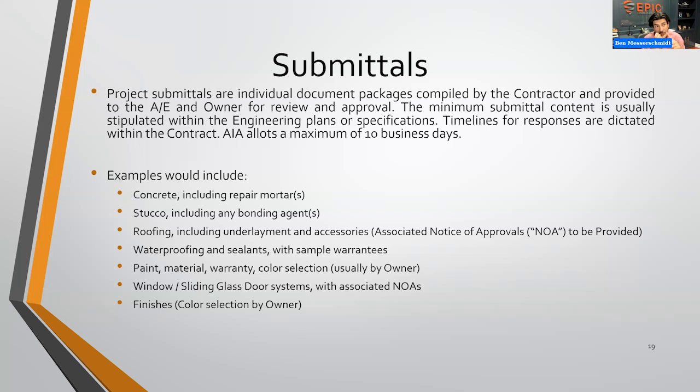you're going to need to pull out the 40-foot palm. You're going to need to pull out all the dirt. You're going to need to expose the waterproofing. And then you're going to need to determine whether or not it was a material defect. So this was mixed wrong in the factory and it was applied. If you find that, then you're only going to get compensated for whatever that square footage is for the waterproofing material. So that's going to be pennies on the dollar, as you can imagine, because you also have to put back all the soil and put back that big old palm.